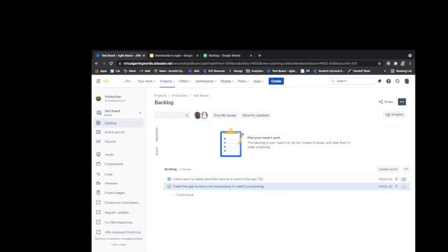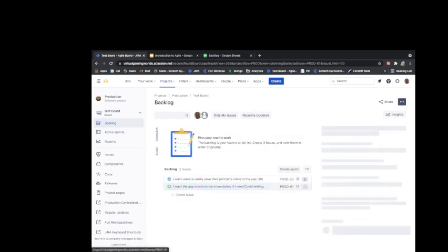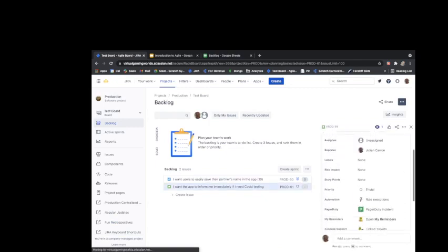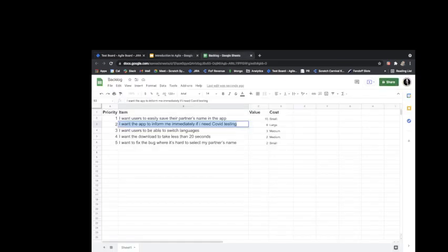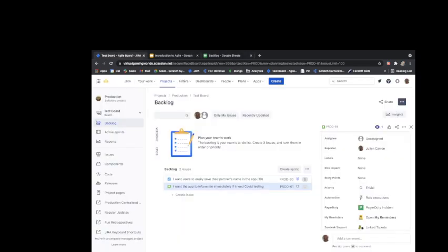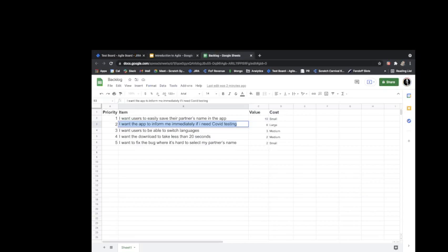So here again, what we can do is just click it, and we're going to enter a story points value. Now, you remember how we said it was a large? The team told us it's a large item. We're therefore going to give it a story points of 8. We're going to validate that. And we also remember that the value was a 6.